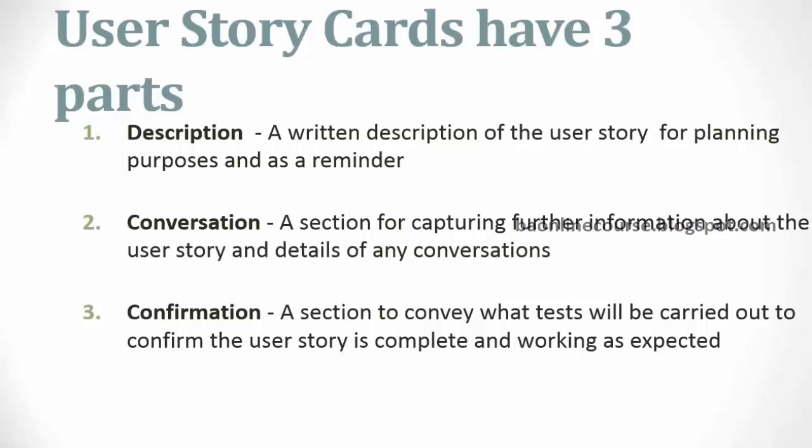So broadly, our requirement would just be captured by that one single post-it note. Okay, you have to capture all your requirements about that particular feature using one postcard size post-it note. And usually it has these 3 parts: a description, wherein you'll figure out what it is going to do, a 1-2 liner generally. It basically tells what your objective is, what it is that you're trying to achieve using that description.